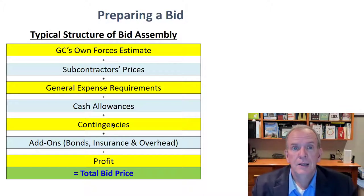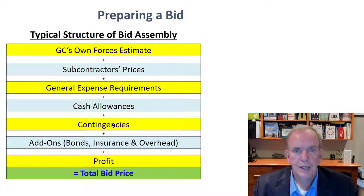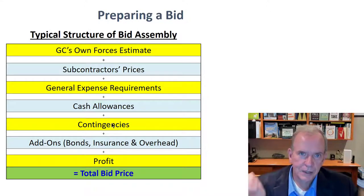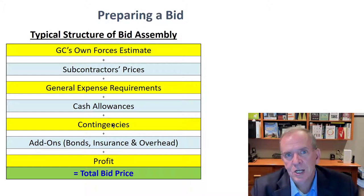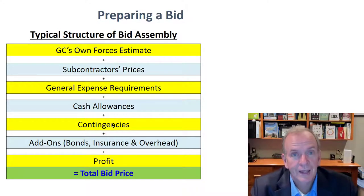Why would somebody be at three million or 2.9? They priced it high — it wasn't their thing, or they were pricing something else that day and thought they'd throw in a bid in case other people didn't price it. Maybe just maybe they'd get lucky. That can be a win for you.